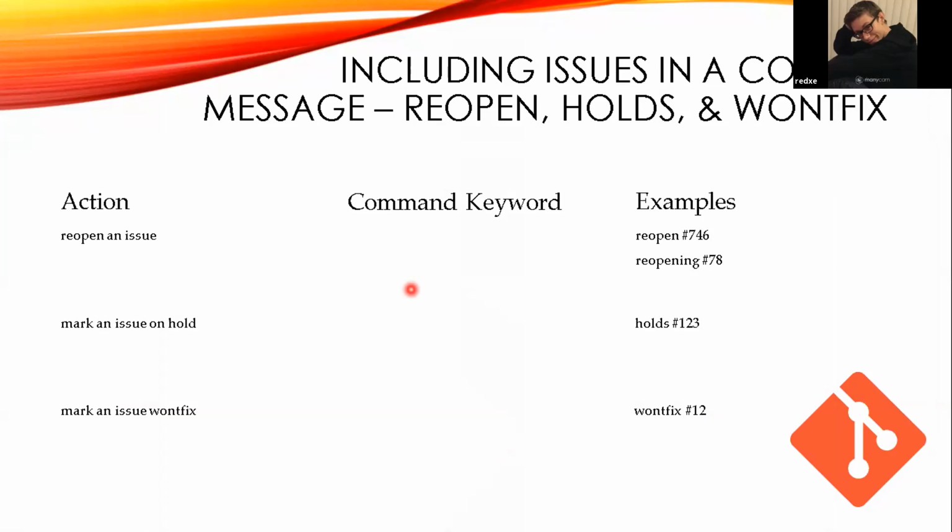Say you thought you fixed it, and then you go back to it later and realize that it didn't fully fix it, or you did something wrong with the commit, or you made another commit that brought up the same issue. You can reopen the issue that somebody had posted on the Bitbucket issue tracker with the reopens or reopen keywords.